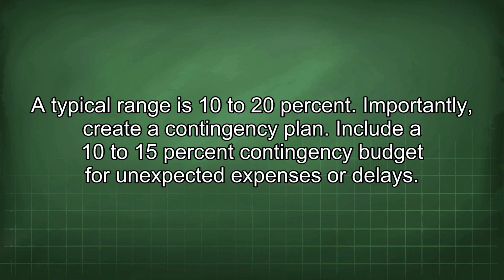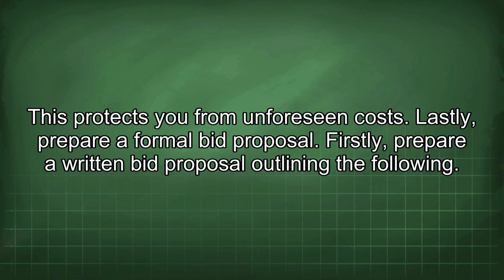Importantly, create a contingency plan. Include a 10 to 15% contingency budget for unexpected expenses or delays. This protects you from unforeseen costs. Lastly, prepare a formal bid proposal.